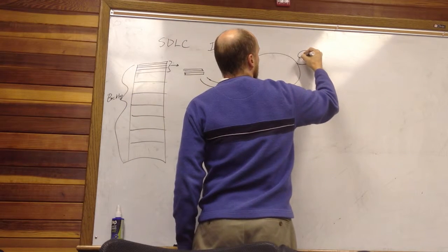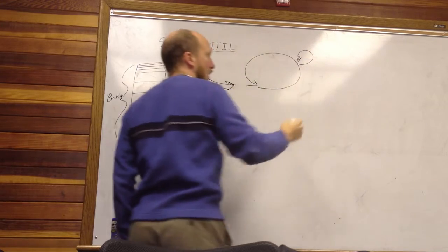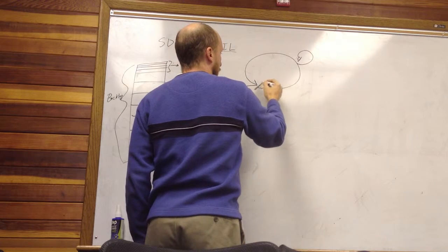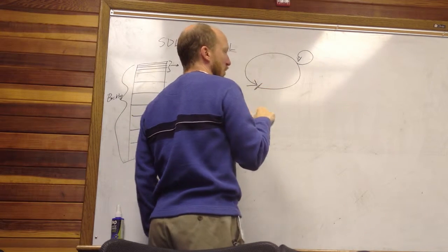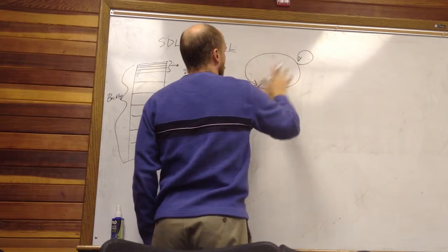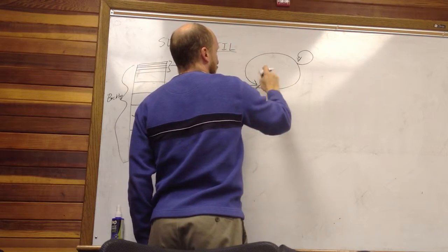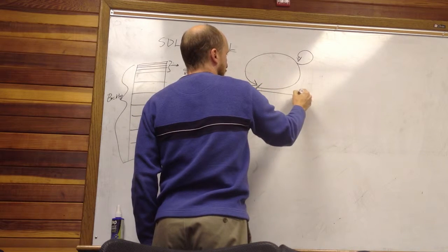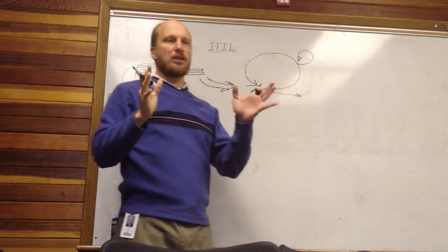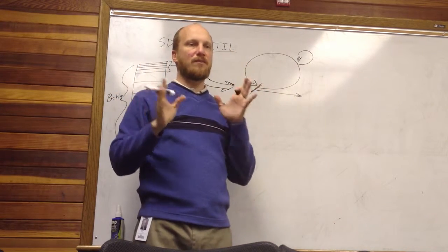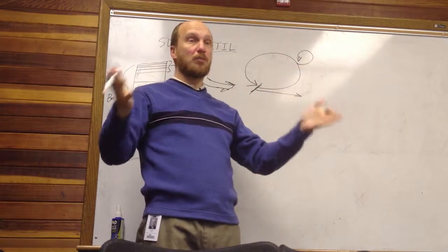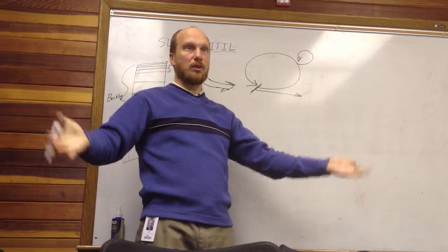and every day we're doing a stand-up to reevaluate how we are doing on this sprint. So we've initiated the work, and this would be the implementation phase that we just discussed. But also validation is happening within this concept. We cannot exit the sprint with faulty or half-done work. We value fully functional, deployable software, right? We don't deliver